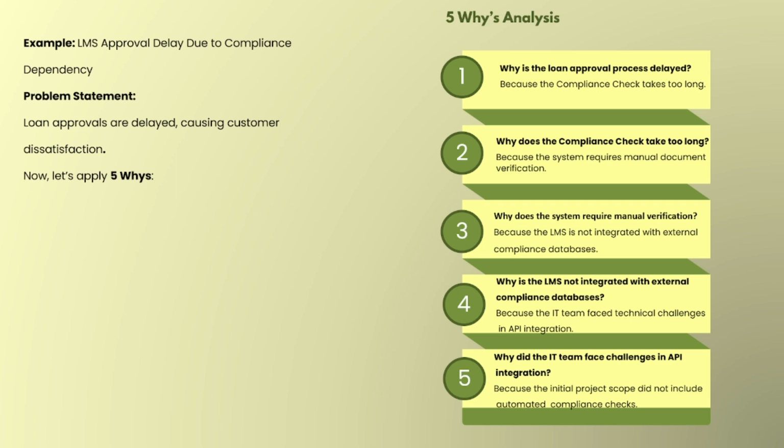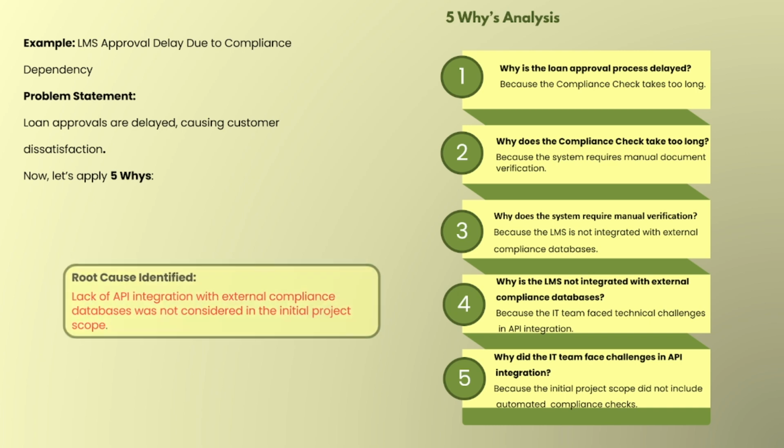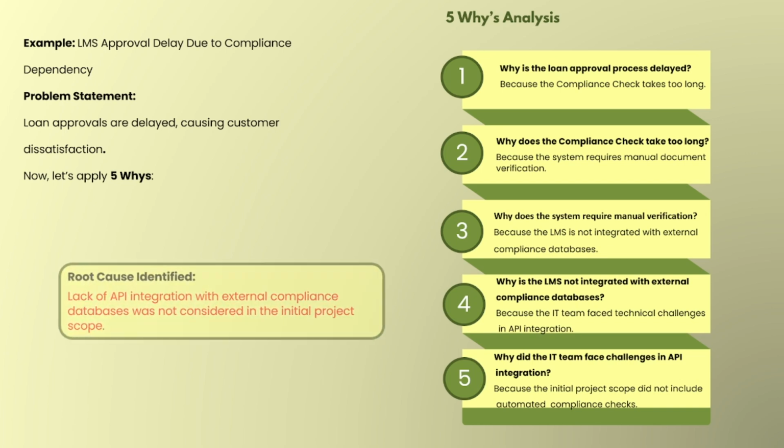Because the initial project scope did not include the automated compliance checks. So with this we have identified the root cause. So the root cause is that lack of integration with the external compliance database was not considered in the initial project scope. So we missed in the initial project scope that integration with the external database is not considered.